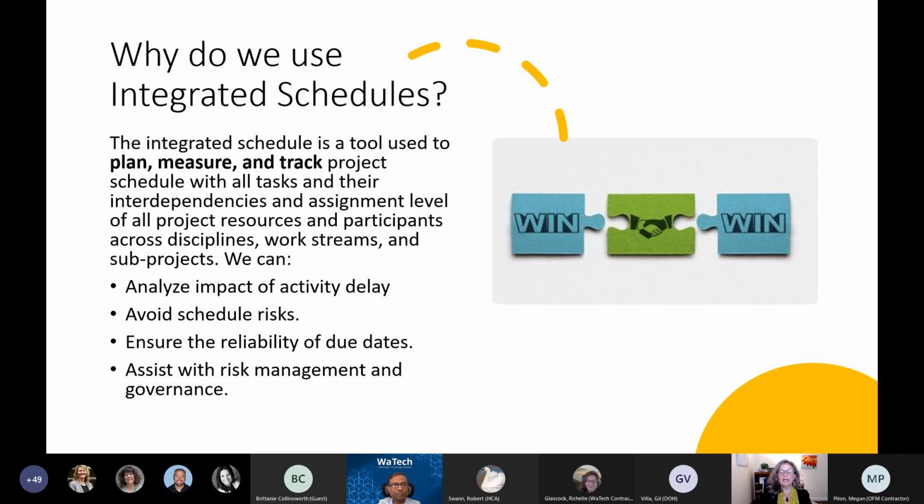So for example, if you need to run a what if scenario, say your product owner gets hit by a bus and he's going to be gone for 3 months and then come back, what is that going to do to your January 1 go live date? And having a work plan that is linked together and fully resourced can be a great way of measuring the impact of an unfortunate issue or risk that might come up on your project.